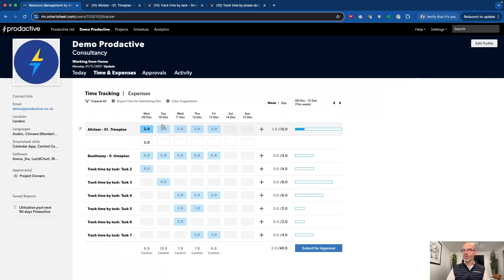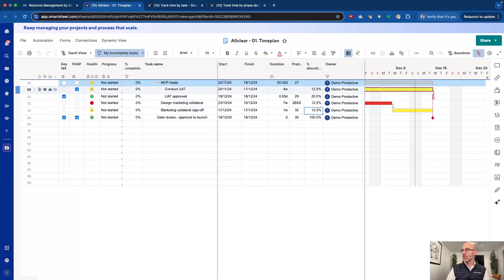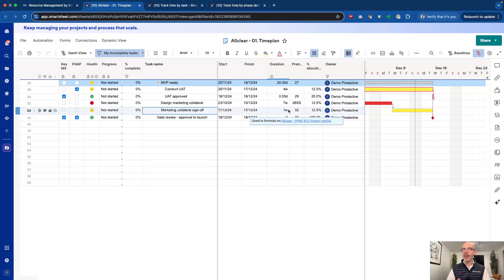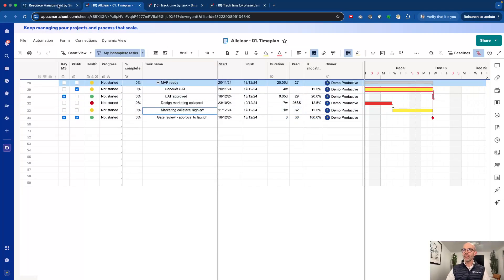I'm going to go into Resource Management and the timesheet I've got up here. In here you can see I've got all my time plan. Having the time plan here, I've just got one single line for the whole project, and this could be multiple tasks. If we go across to the project, you can actually see this relates to multiple tasks happening at this moment in time. I'm allocated for 12 and a half percent, which is equivalent of one hour, to the tasks of 'Conduct UAT' and also 'Marketing Collateral Sign Off'. But how much time do I spend on each one? Don't know.